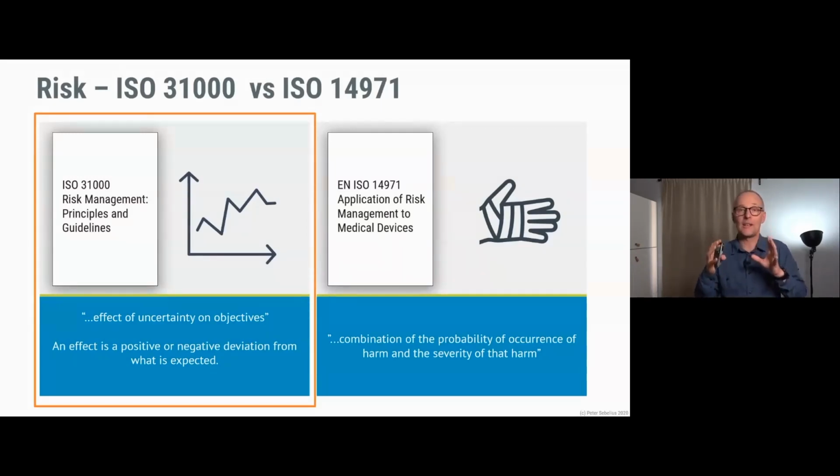So looking at that and saying, what could go wrong in this project? If you have something that says, well, one issue would result in a 17-week delay, we should be mitigating that. We could use avoidance strategies or mitigations where we reduce the likelihood or the consequence of such failures or problems. Either way is fine, but we should work very actively with it.